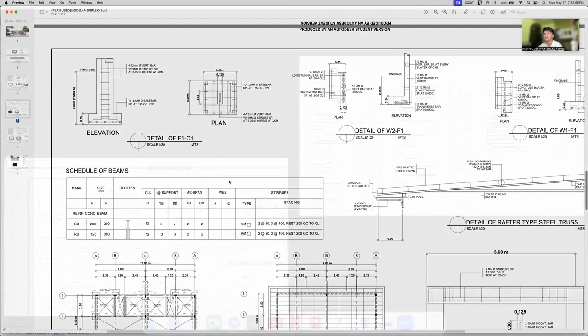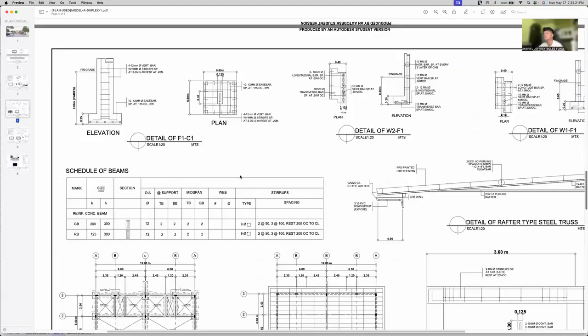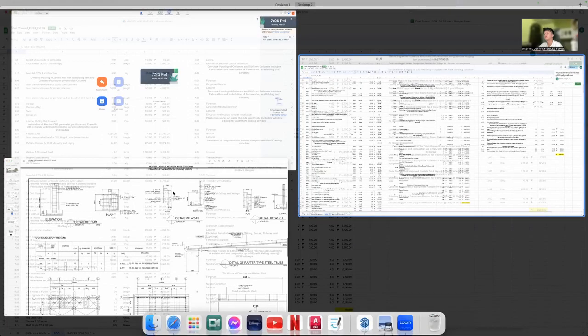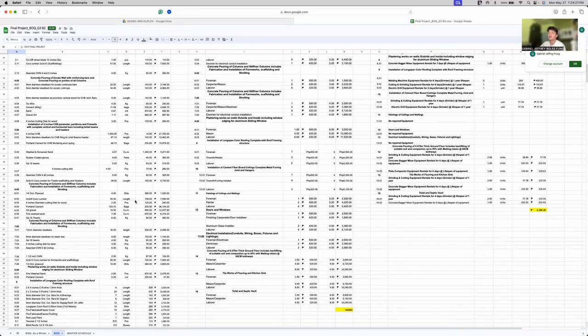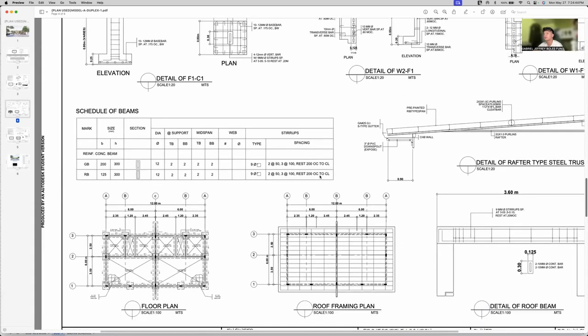So with that, we came up with a value of 55 lengths of 2x3x8 coco lumber. And then for the cutting disc, it was estimated with the degree of decay or wear and tear that the coco lumber and also the plywood would use. So after that, we then